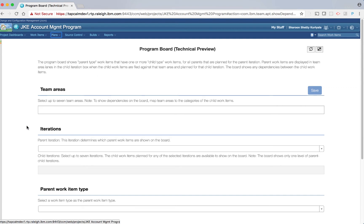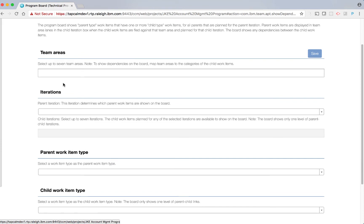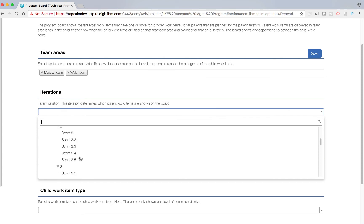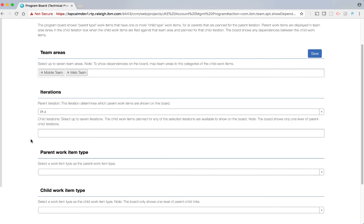In the preferences view, you are allowed to select up to seven team areas. To show dependencies on the board, you have to map the team areas to the categories of the child work items. For iterations, you need to select the parent iteration — this determines which parent work items are shown on the board. The current iteration on this project is PI4, so let me choose that. For child iterations, you can select up to seven iterations. The child work items planned for any of the selected iterations are available to show on the board. Note the board shows only one level of parent-child iterations.